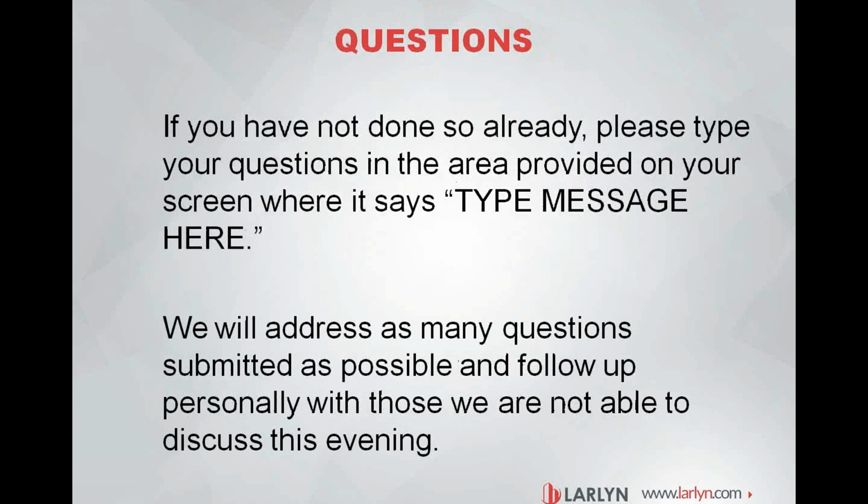In the 4th year, the reserve fund study that needs to be done does not have to be on site. It's what's deemed as a Class 2 reserve fund study. And what they do is they take the information from the past 3 years and ask for an assessment of any changes that weren't scheduled for. So for example, if you put in a new roof but that wasn't scheduled to be done for another 10 years, that would be disclosed. From there, the engineer or architect will update the reserve fund study so that you can identify where the spending and costs need to be.